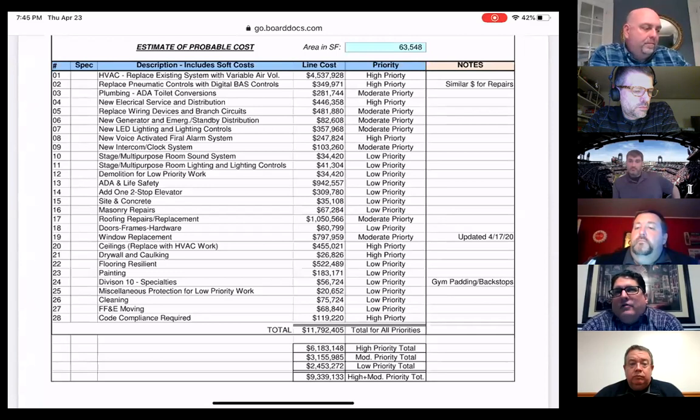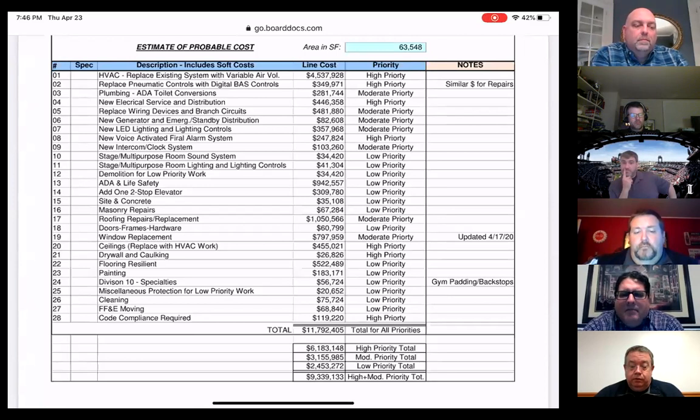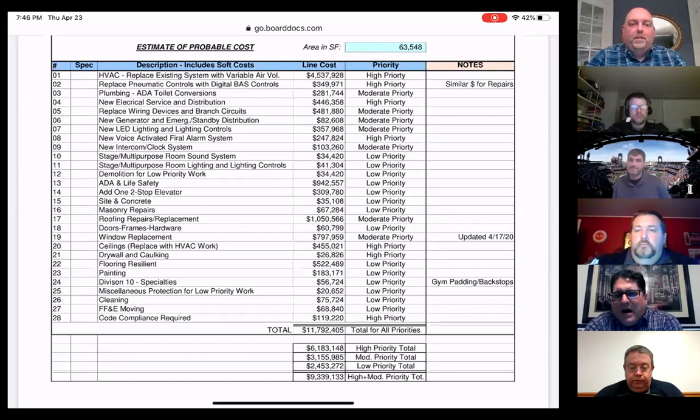Well, my understanding of construction inflation over the last several years, let's stay simple with it and say it's 2% a year. And I think I would go back, and I might have that number a little bit bigger because of when we bid it, not when we finished it. So when I think about what Tawaka costs and what this would be if it were the same size, depending on how the land is laid out, and what we would want to do with it, you're not going to get up to $40 million.